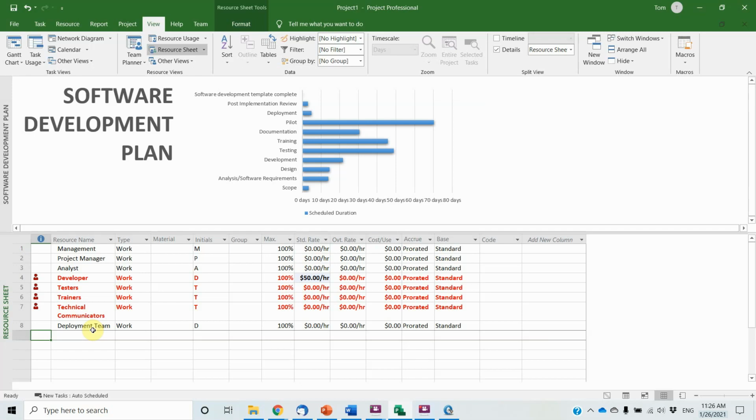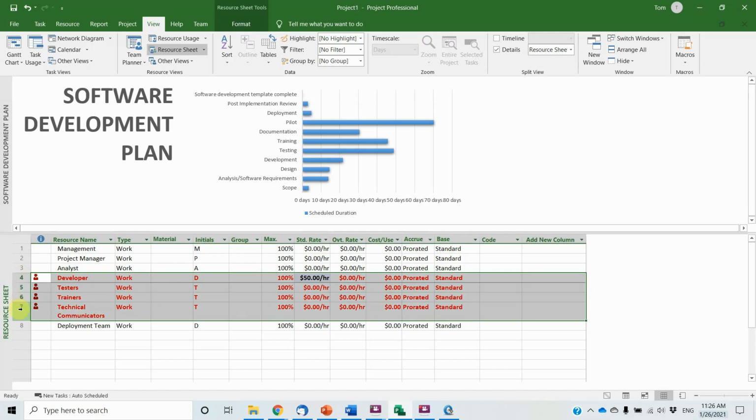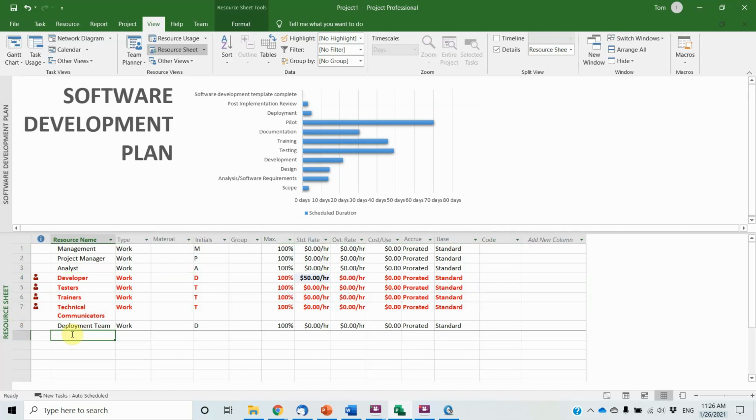If you assign two simultaneous tasks and each requires 8 hours, then that person will be labeled red, which means this person has been overused. In one word, you do not overuse your team. On the other hand, you need to assign them enough work to do.